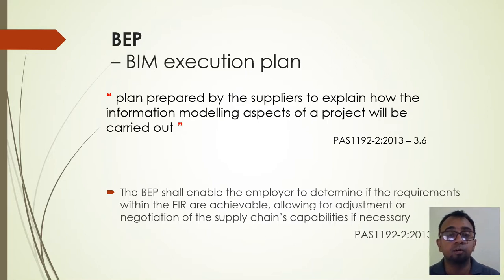Therefore, upon the agreement, that is upon the award of contract, a post-contract BIM execution plan will be prepared.